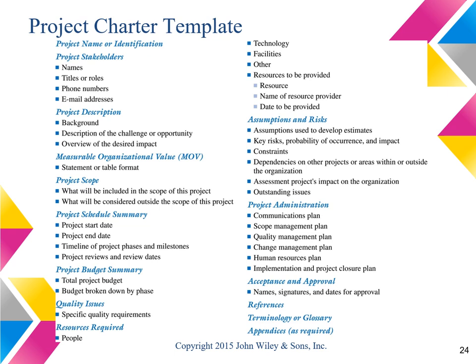In general, the project charter and project plan should be developed together. The details of the project plan need to be summarized in the project charter, and the infrastructure outlined in the project charter will influence the estimates used in developing the project plan. It is the responsibility of the project manager to ensure that the project charter and plans are developed, agreed upon, and approved. Like the business case, the project charter and plan should be developed with both the project team and project sponsor or steering committee to ensure the project will support the organization and that the project's MOV remains realistic and achievable. The project charter will detail everything needed to carry out the project.